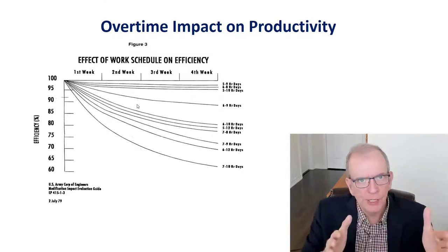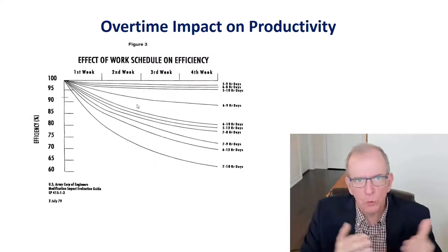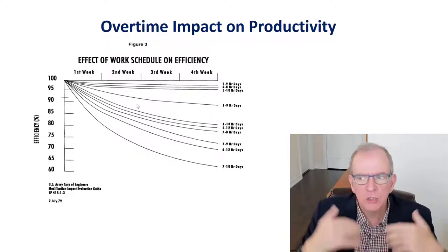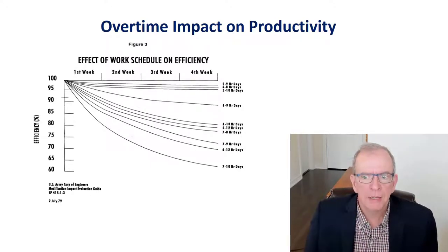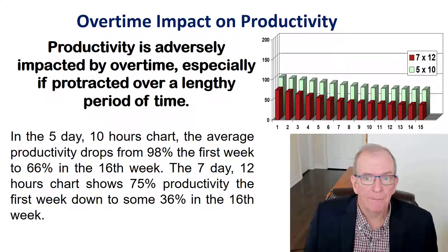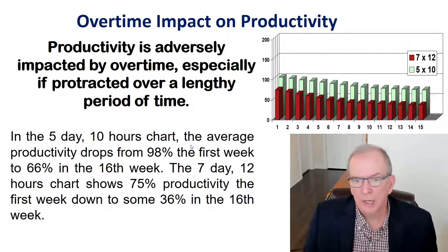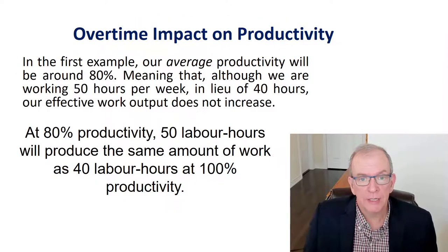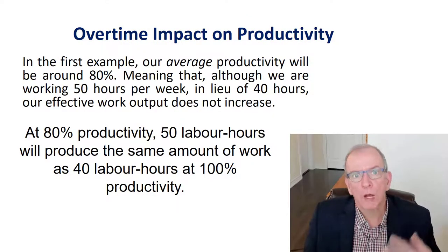Normally you finish and then you start the next day. Well, you know where you finished and you know about any changes or any requirements that came in. So that's not problematic, but you do need to think about that. So, overtime impact on productivity: as overtime goes up, your productivity rates go down. Keep that in mind when thinking about pricing and costing changes, if it's going to require extra overtime.